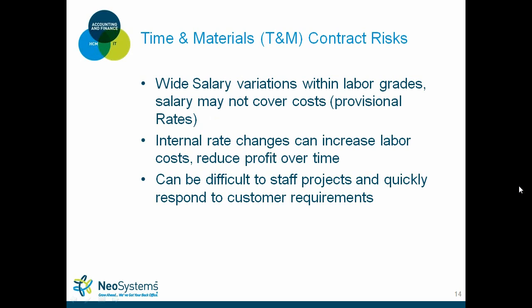And some of the risks that are associated with time and materials, the profit percentage for time and material can be very good. At the same time, you can really kind of hurt yourself in a time and material type basis because of what you originally bid. So during the original RFP or the cost volume pricing development, you might already have an in-house resource that you want to go ahead and bid out. So then you add in fringe, overhead, and G&A, put in a profit percentage, and you end up with a specific bill rate for that first year of your contract.